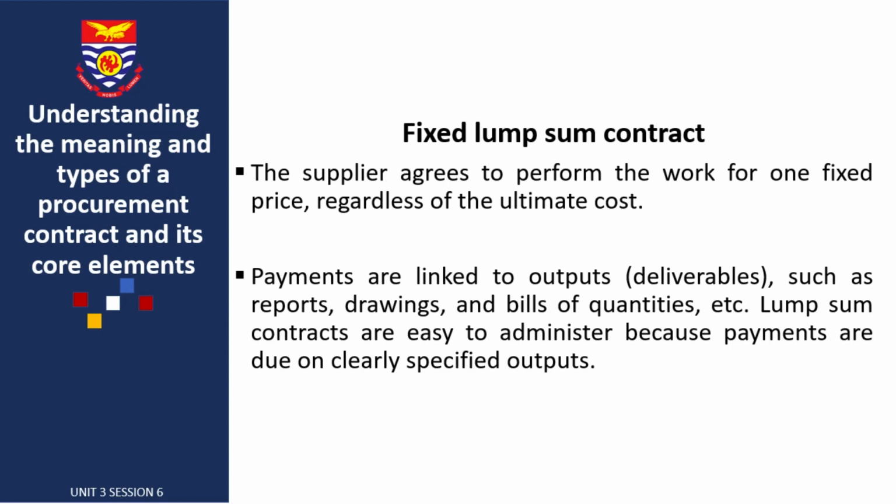Payments are linked to output or deliverables such as reports, drawings, and bills of quantities, etc. So lump sum contracts are easy to administer because payments are due on clearly specified output.